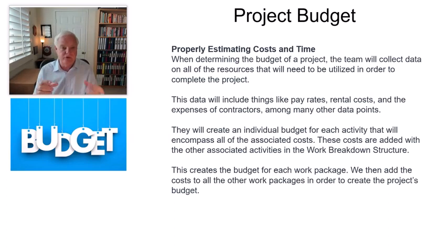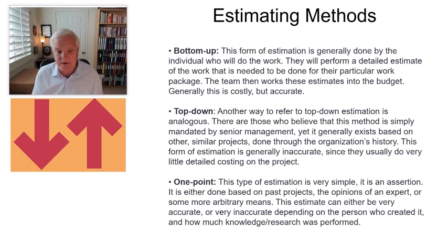Unfortunately, in your situation, you were given a budget up front. You didn't get a chance to decompose the WBS to understand how far off or how close it is to that. So that's the difference you're going to see, especially when you start putting your schedule together. Once you create that baseline view, you then will create another view. That other view is going to show what all the additional tasks are going to be, and you'll find out whether you're up or down on your budget depending on what the addition of all those are.